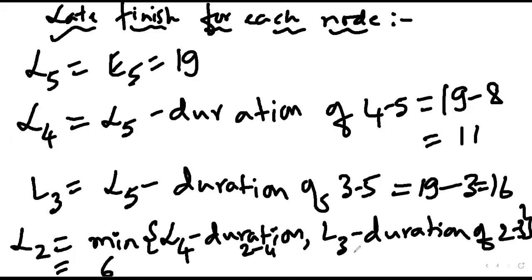And L1 should be compulsorily 0, whatever may be the problem definition. Okay, L1 should be 0. That ensures that your answers are right. In this case, are you getting L1 as 0? So is the L1 answer 0? Yes, sir. L1 will be equal to 0. I'm not calculating it, but I'm directly writing it in the diagram.